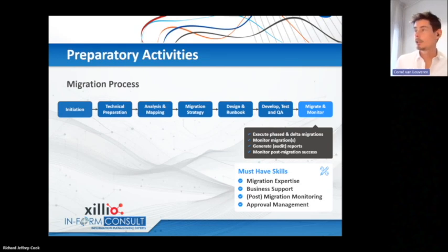to the next. But it is also possible that you have a lot of terabytes and it doesn't fit in one weekend. And then you can choose to migrate, for instance, 2 weeks before the deadline, you can migrate everything. And in the last weekend or last night, you can migrate the delta. So the differences since the last migration.